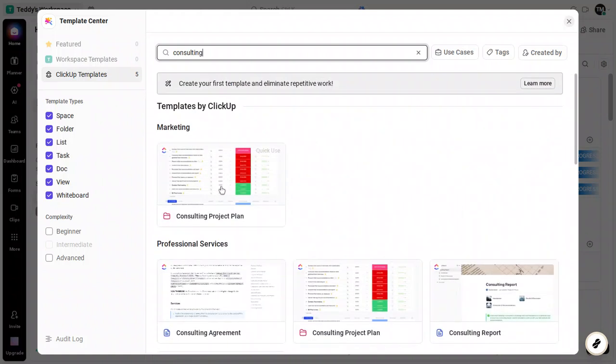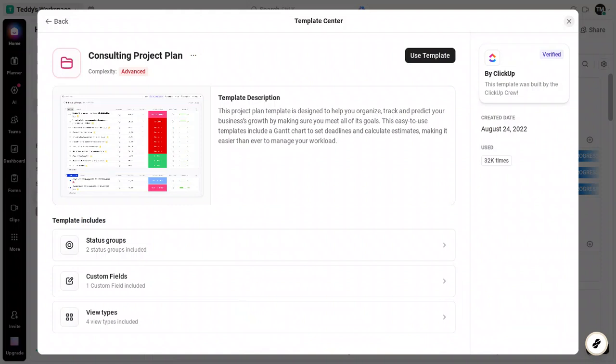Open the tasks by status view to understand how work moves from intake to completion. Switch to the schedule view to see how due dates align across the engagement. Then check the project summary to get a clean, high-level snapshot you can reference during status updates.